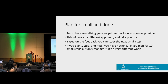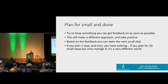If you break the work into small steps, try and get to a releasable thing as soon as you can. Because if you define one thing and fail, miss the deadline, or can't deliver it, then you've got nothing. But if you plan ten increments and only manage seven or eight, you can still ship what you've got and improve it later.